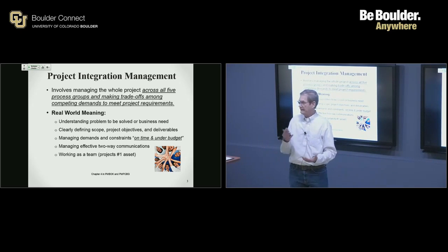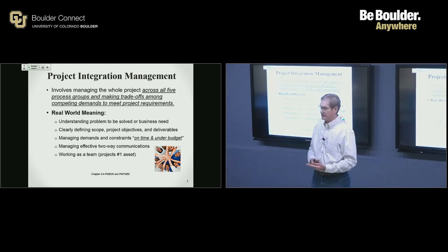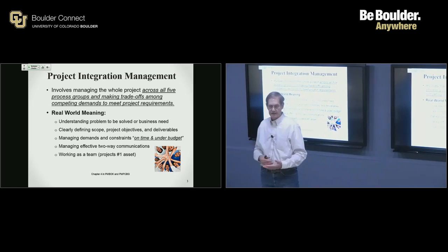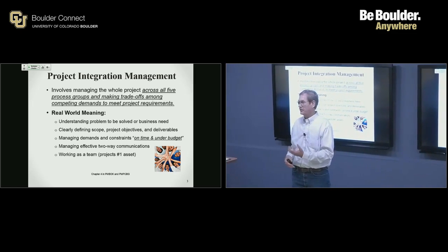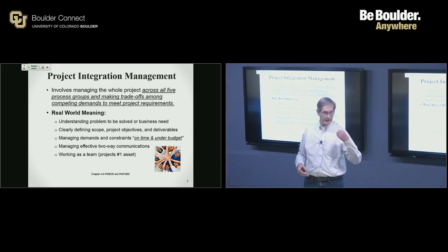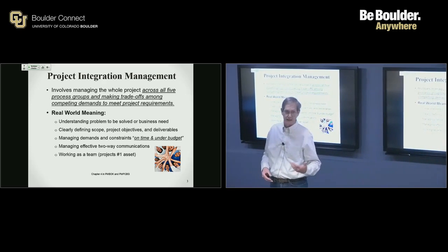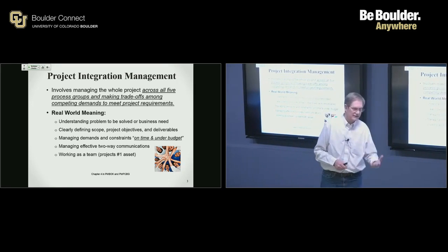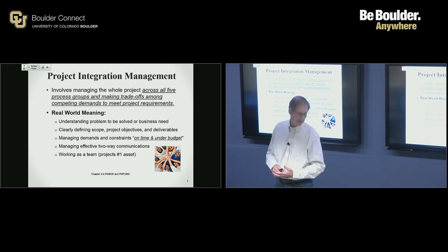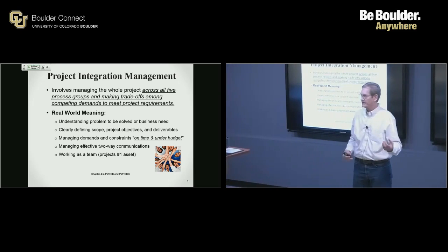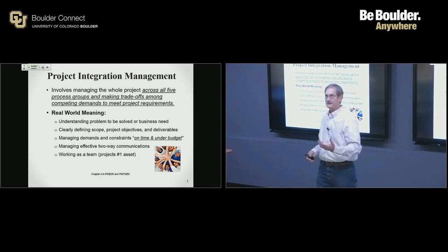And so you may have a budget constraint where you can only hire people on your project of a certain band level. And I've actually had to go back to support managers and say, hey, thanks for assigning Andrew to my project. He's a top dog. He really knows his stuff. But he comes at a higher rate, and I can't afford that. I'm going to have to find someone else that perhaps doesn't have the experience, doesn't have all the years that Andrew has.